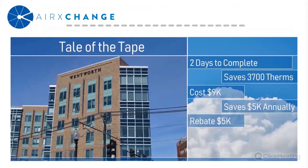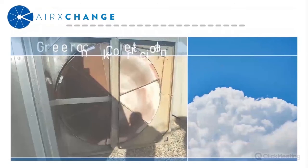And the project was also awarded a pretty generous utility rebate based on the gas savings that were submitted to the utility. So based on the cost of the equipment and the rebate dollars, the simple payback on the equipment was less than a year. So very successful project. Customers are very happy.